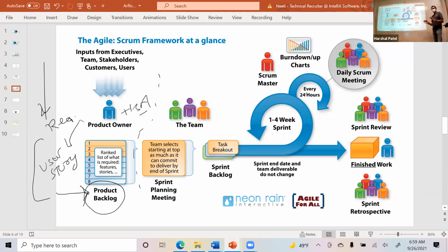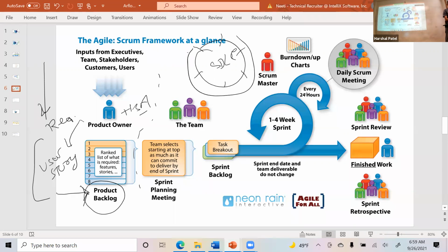In the Agile world, the sprint duration is typically 2 to 3 weeks. What does that mean? So this is our SDLC. You have planning and all these different phases here. In 2 to 3 weeks, this whole process needs to complete, from planning to release to production. All the SDLC phases need to complete in 2 to 3 weeks.